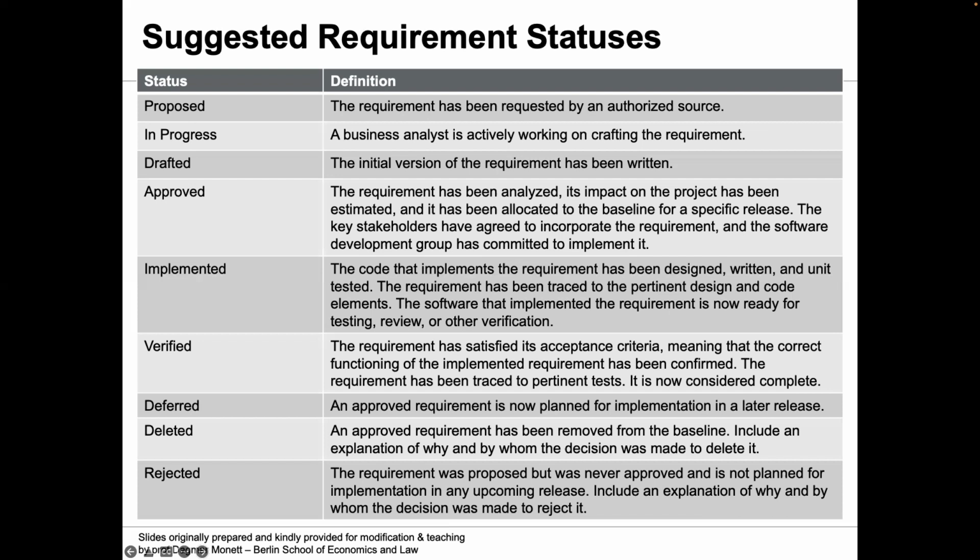Sometimes the developer team may get over-optimistic and say we are done with 90% of these requirements. But if we are unable to break them down under these different statuses, there's a high chance that we are going to run into the risk of failed requirement delivery. This means we would be reworking and wasting precious time and resources.